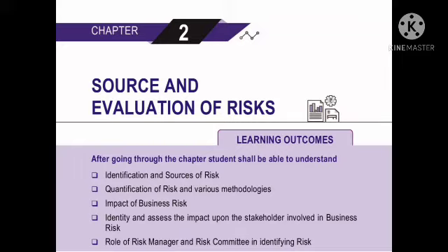It is complicated by a number of factors including, but not limited to, opportunities and threats that can interact in unanticipated ways. Example: schedule delays may force consideration of a new strategy that reduces overall project duration. One risk event can cause multiple impacts. Say late delivery of a key manufacturing component causes cost overruns for the manufacturing facility, delays schedule to customers, and results in penalties from the customer.